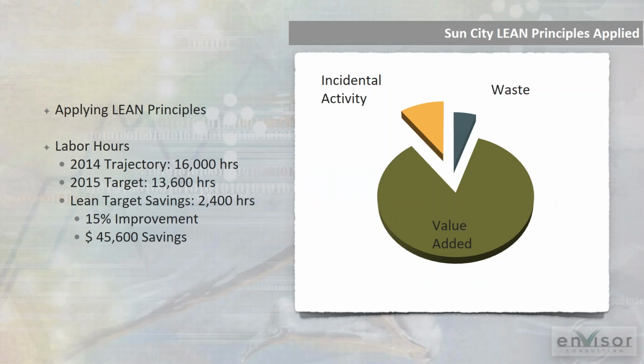But at the end of the day, we shared all that information with the client and went to work on it. And that single season, the margin improved by almost 10 points. The client calmed down and became a whole lot happier. The project looked better. And just as important as anything else, I think that the quality of life for the guy managing that job went way up.